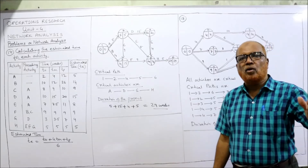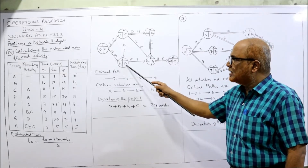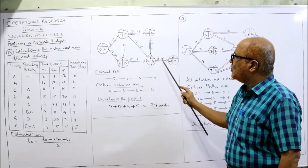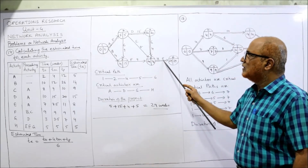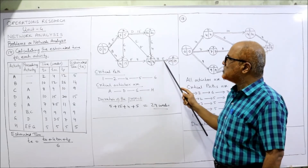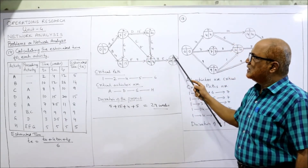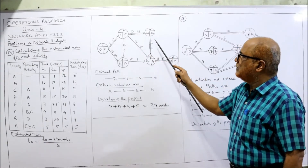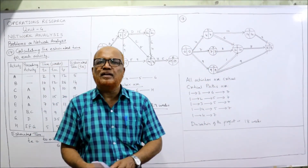The critical path is the longest path where EST and LFT values are equal at each node. Going through nodes 1→2→3→4→5→6: 5 + 15 = 20, 20 + 4 = 24, 24 + 5 = 29 — this is the longest path. The critical activities are A, D, G, H and the duration of the project is 5 + 15 + 4 + 5 = 29 weeks. Problem 17 is complete.